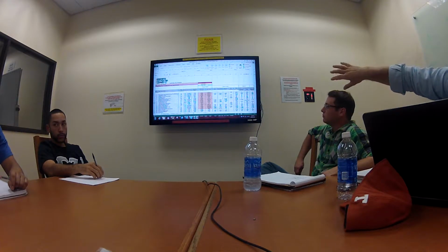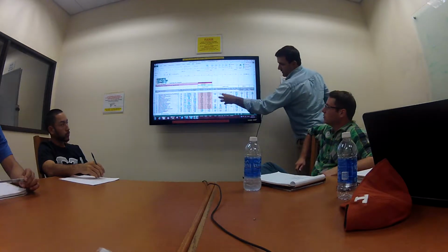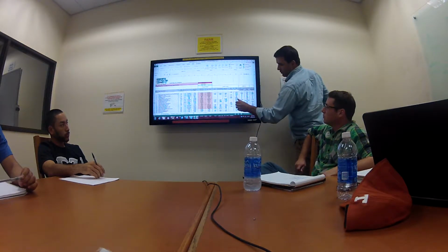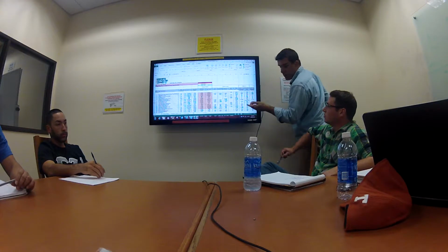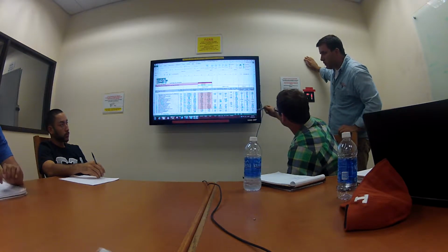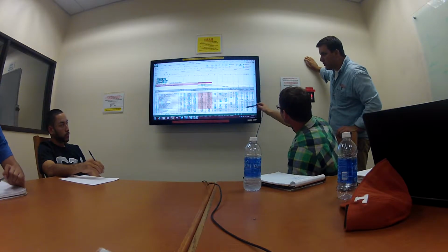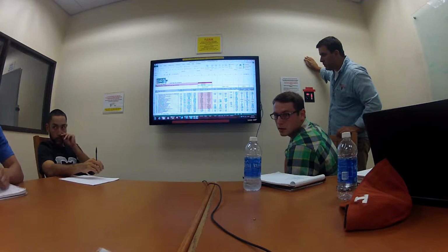The indirect on it. Sorry, one more time. So I'm catching how you're, I get that. You took all these and it gave you this total cost, and then from this total cost, you determine these because these are a percentage of this total cost for each category. So basically, you're taking your total direct costs, and they give you indirects, right? Right. So you're basically figuring out a percentage to apply those indirects to each item. So I got it. Hopefully, it's going to help out on this one.